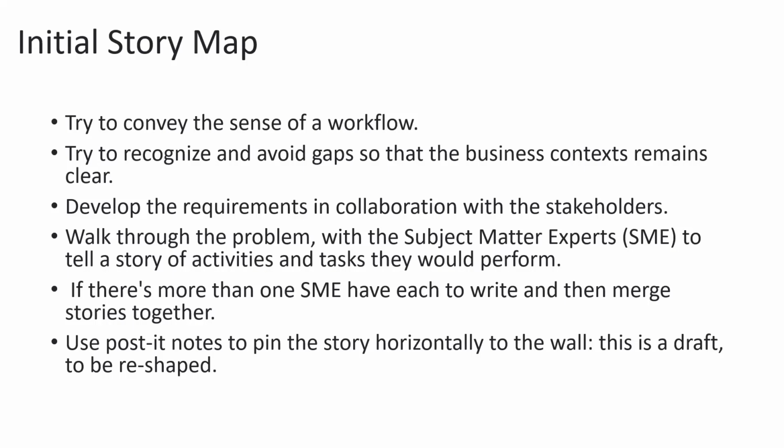While doing the initial story mapping, there are certain points that we need to remember and follow, right? The most important thing is understanding the workflow and conveying the workflow. The project has multiple activities to take place. We need to first define and convey the workflow. And this workflow would ideally be the epics or the activities that will help you divide a big, entire workflow into a couple of steps, 5, 6, 7. These are your effective epics, right?